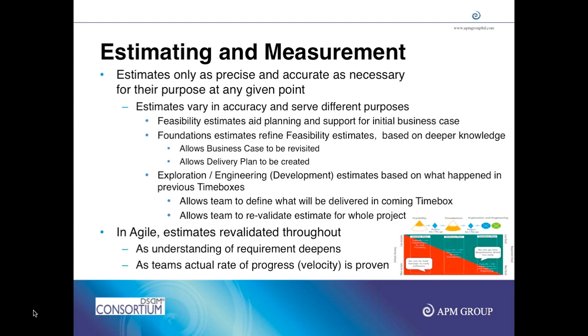But they don't tell the rating. They pick up the card that they think defines their rating, but they don't disclose it. It is kept blind. And then the scrum master or the agile coach or the project manager or the team leader, whoever is undertaking this exercise, asks the team, could you now tell us what is your rating?